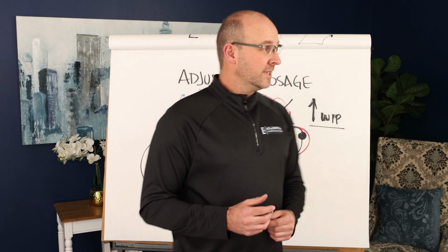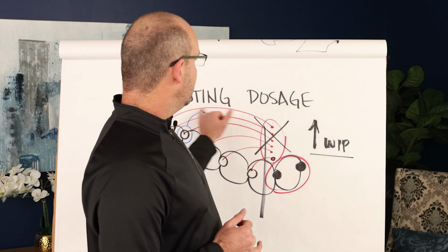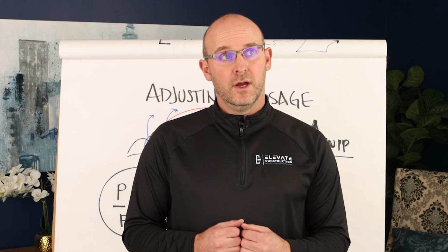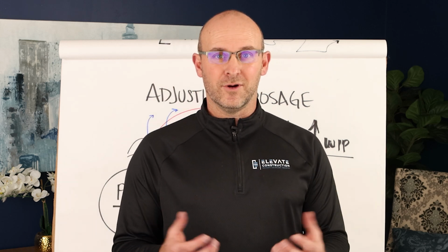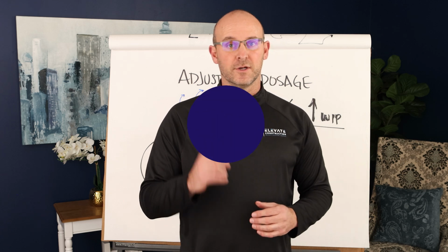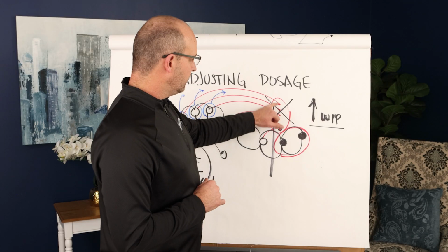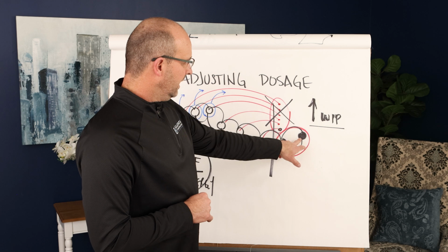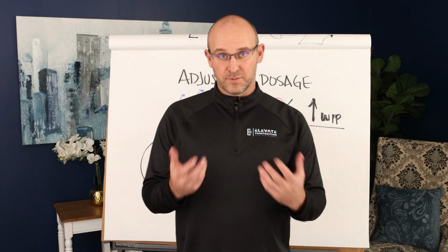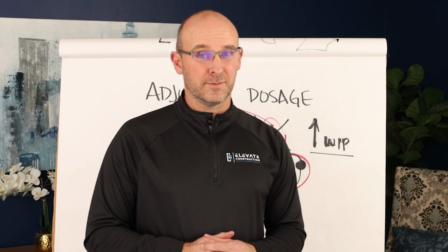Here's what I want to do. I want to give you a couple of tips and tricks here. Here are some signs that you do not have the right dosage and you are accruing or accumulating a lot of unfinished work at the wrong dosage. Number 1, your work in progress is continually increasing, right? You have more things to go back to do in addition to the things that are planned for that day or week. Number 2, you might have an incentive system that actually incentivizes you to take on more work than you can actually possibly take.